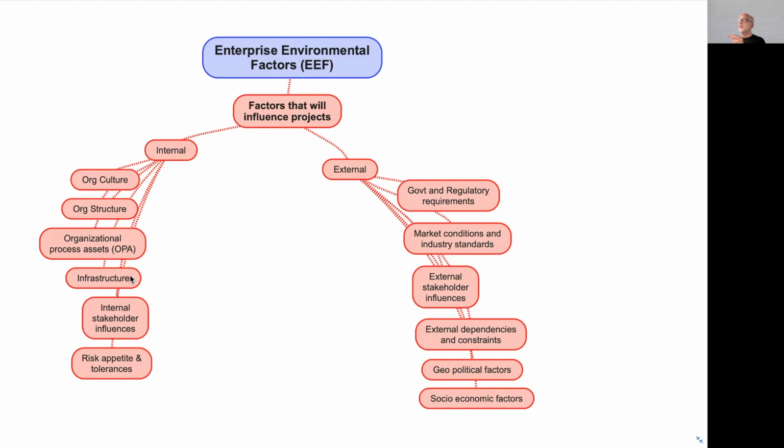Then infrastructure availability. Will we have sufficient power? What is the width of the road? What about uninterrupted power supply? What about water at the site? What other infrastructure facilities are available? Do we have a water tank there? Et cetera.